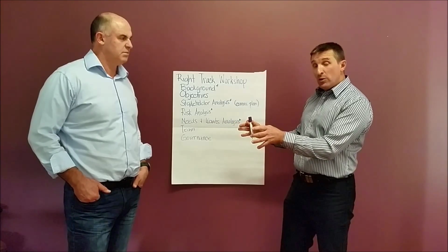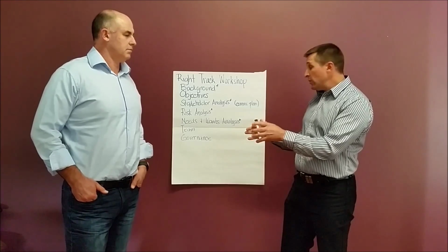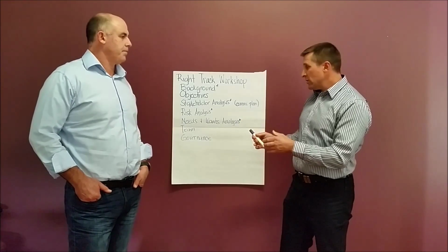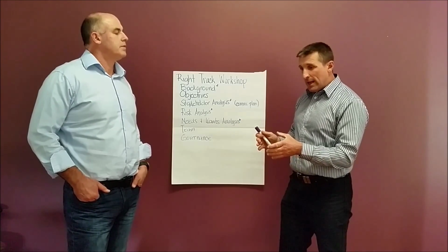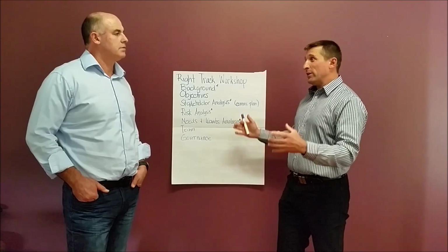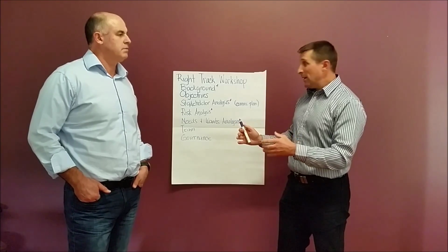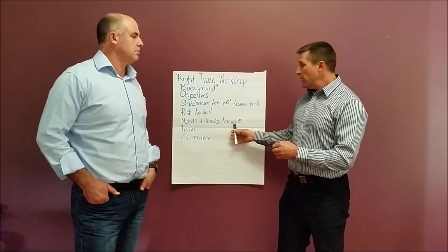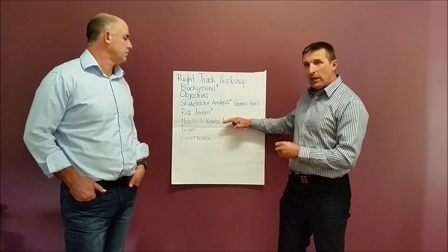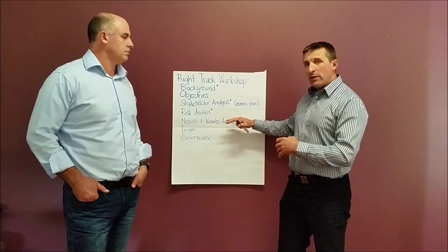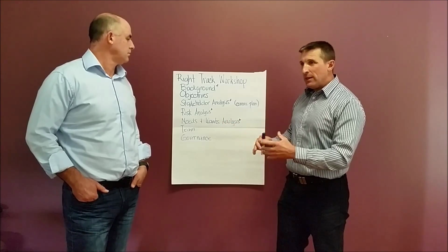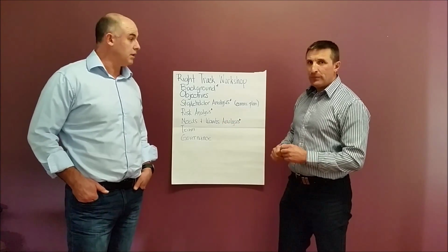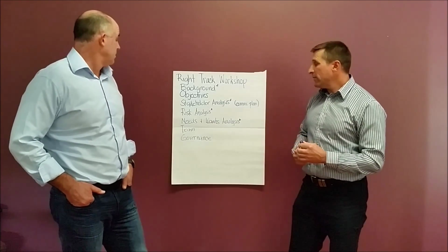And so it's really useful for making decisions, and it's really useful for steering clients, particularly if they've got a limited budget and they want all these things, but oh no, we haven't got enough money. Okay, what's more important than the other one? And it's best to do that at the outset, so you've got it nice and clear in your head, rather than when you're in the middle of something and then they start getting all emotional. Okay. So we've just found it to be really effective.